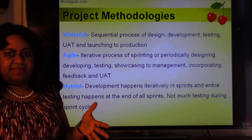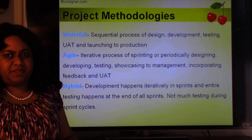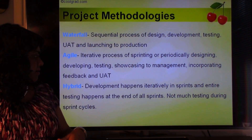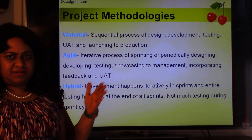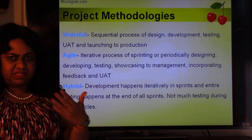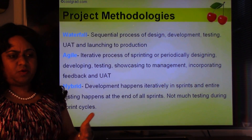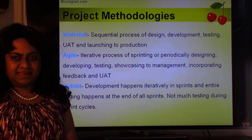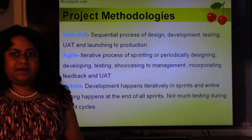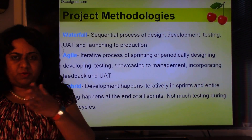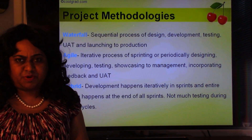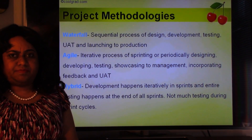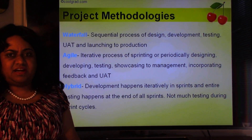UAT in an Agile project happens at the end of all the sprints, before launching to production. In a hybrid project, development happens iteratively in sprints, but there's usually no testing or QA done during the sprint cycles — all the testing is done at the end of all the sprints. So the QA and then the UAT is done at the end of all the sprint cycles. That's like a mixture between waterfall and Agile.